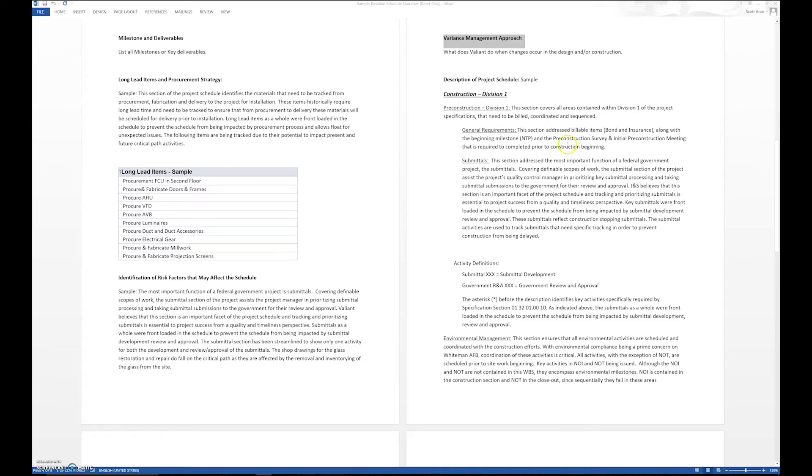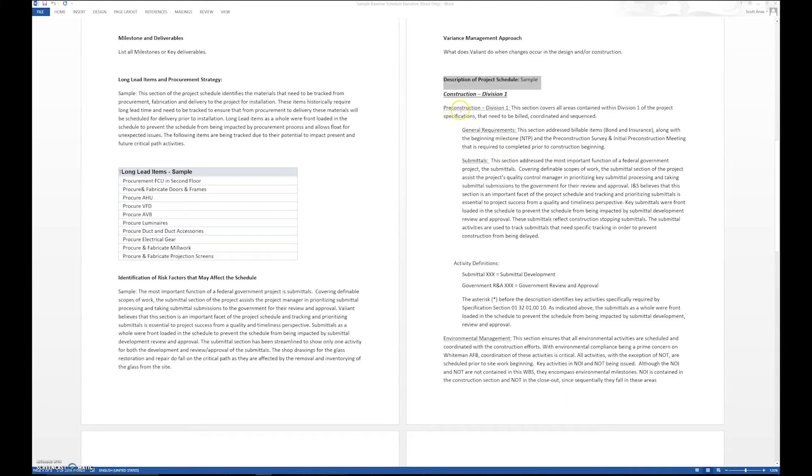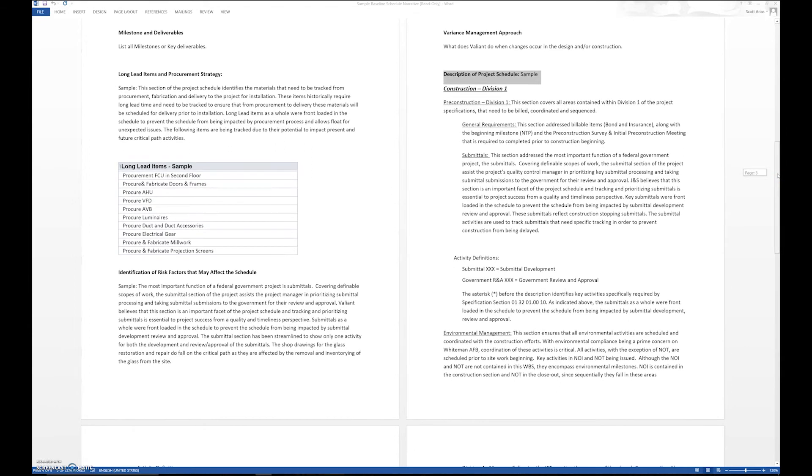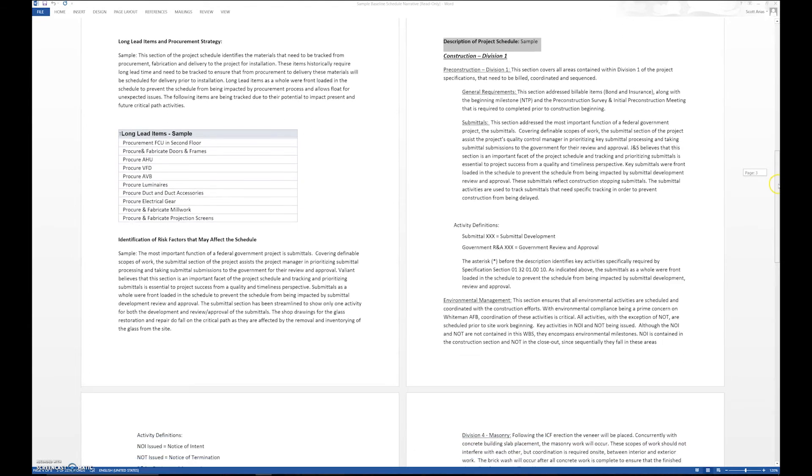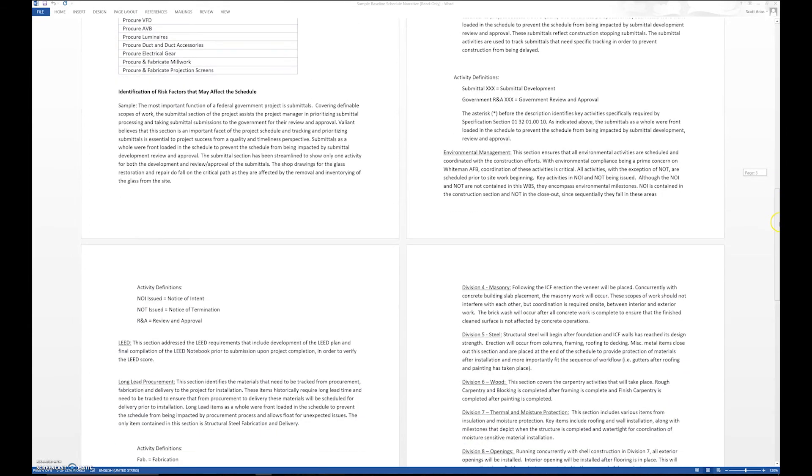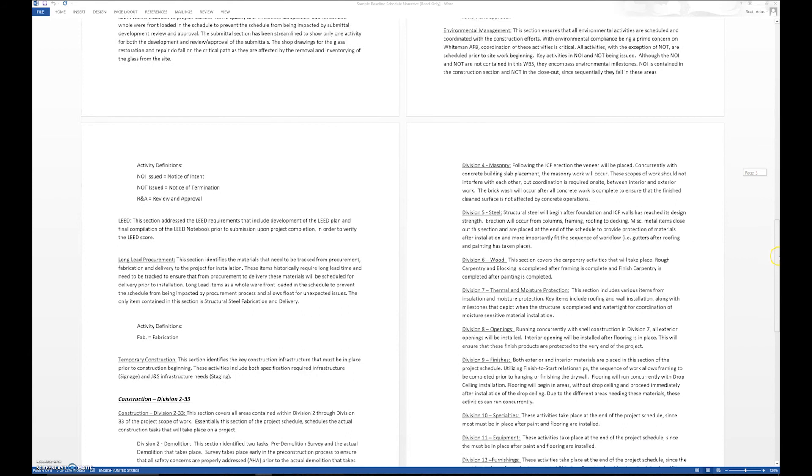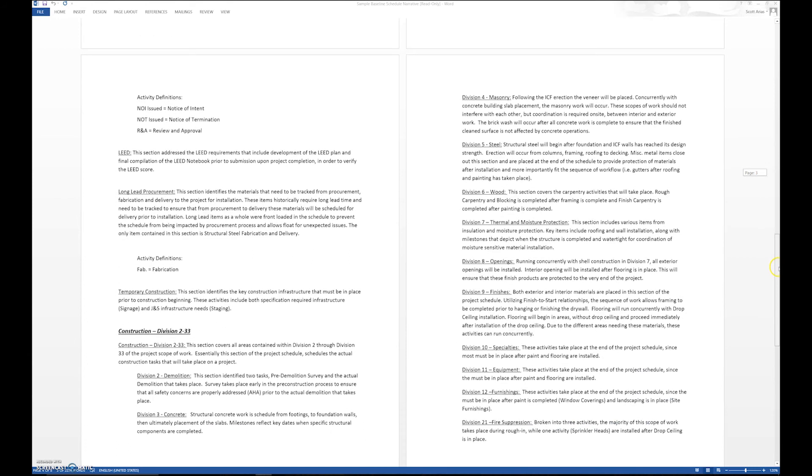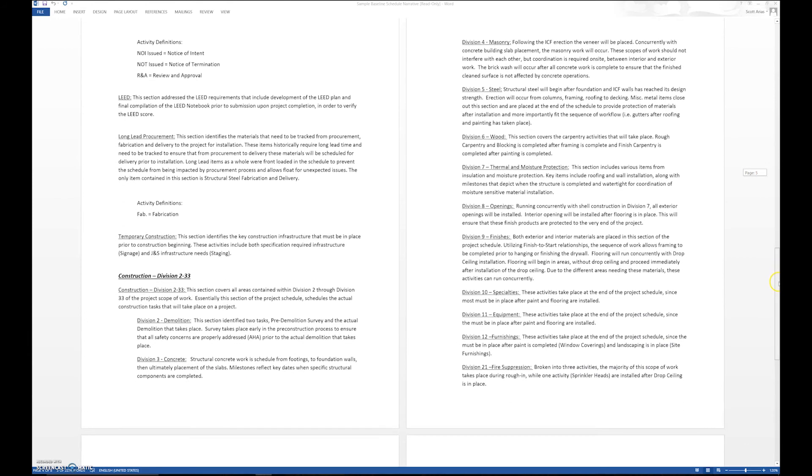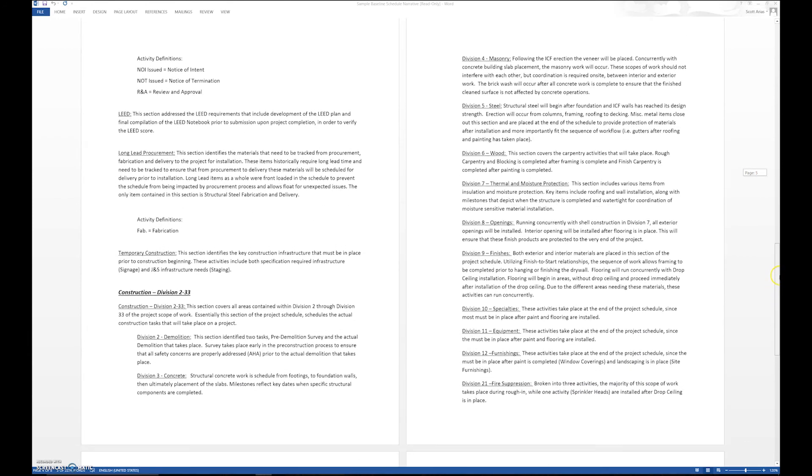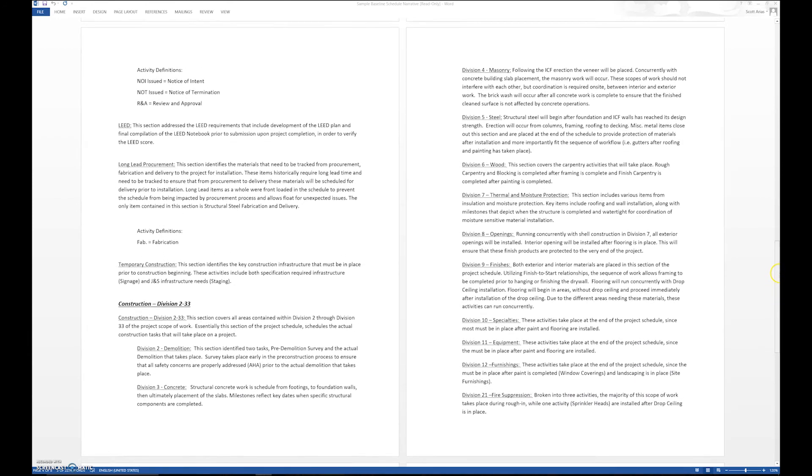Then we go ahead and give a description of the scope of work. I've gone ahead and broke it down by CSI divisions. I just said CSI Division 1: we talked about pre-con and general requirements of submittals, and we get a narrative format of how we put together the schedule and what's inclusive in each of those sections. We go on to talk about long lead items and temporary construction.